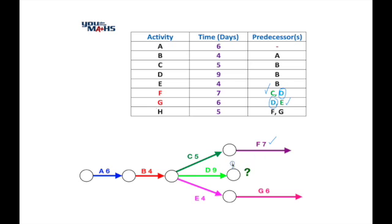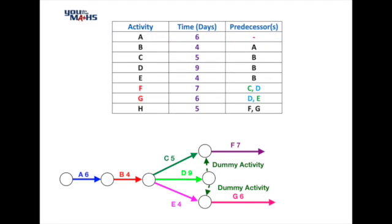So what we do is we put a dummy activity in from the end of D so it splits between the two activities F and G. It must run into the node that's before F and before G because it is a predecessor and neither activity F or G can start until D is completed.